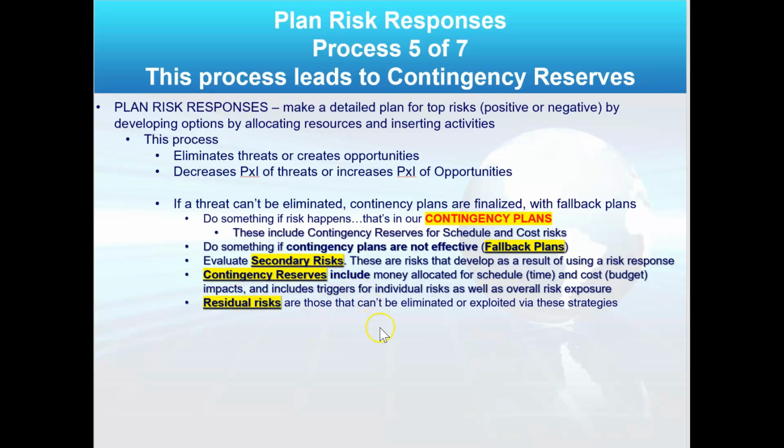Now, contingency reserves, we've talked about many times. There are two types of reserves: contingency reserves, which you own, and management reserves, which management owns, right? So with contingency reserves, I want to use them for the risk they're identified. Otherwise, and I've seen this on many tests, that money doesn't go back into your budget. It goes back to the company, right?